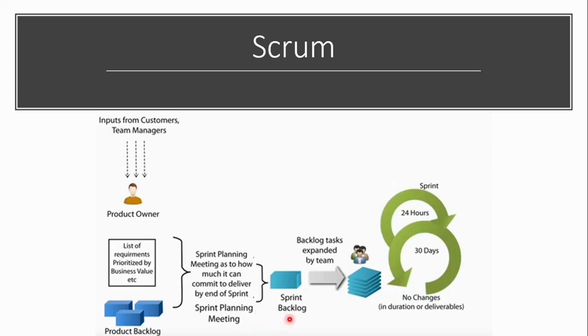So they all get together and take certain backlog items, certain features, the customer requirements, into this sprint. So there will be sprint planning, and maybe there are 100 requirements here, and for the next 2 weeks, or maybe 2 weeks, it depends on your organization, you're taking 10 requirements and trying to develop those requirements. That subset of requirements is called the sprint backlog.